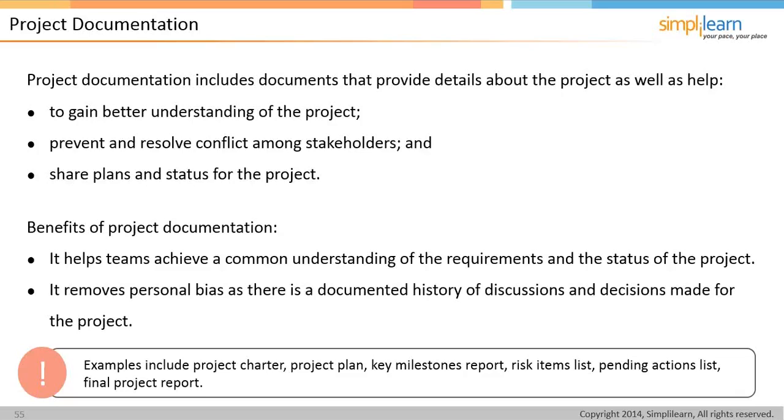It's going to have that charter, that outline of what you're working on with your objective statement, who's involved, and where you think you are today, your baseline, where you think you'll be able to get at the end of the project, what that improvement would mean to the organization, both the tangible and intangible benefits that can be derived from the project, all that kind of stuff. So it's crystal clear to anybody looking at this today, tomorrow, next month, what the project is all about. And if anybody comes back to the project leader and says, well, gosh, what about this? You can say, was it part of the scope or was it not? If it's out of scope, it's out of scope.